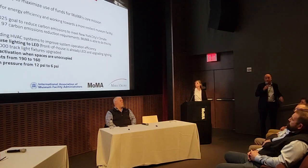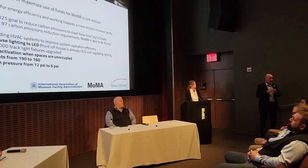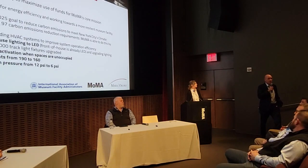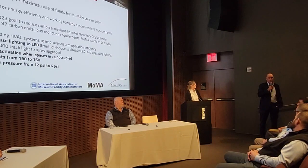So we were able to basically go through every unit, every air handling unit, every system, chilled water system, heat exchanger, and figure out where there might be efficiencies, and where there might be deficiencies that were affecting performance, leaking valves, those kind of things. So we had a retro commissioning process. We use a platform called CX Alloy, which keeps everybody on the same page. There's over 1,000 items, I think, that have been entered into it since it was put into effect a couple of years ago. It's administrated by our sustainability team, but it's a shared platform. So the BMS vendor is assigned to some of the tasks, the consulting engineer, and there's some design issues that are really day one issues that have to be worked out.